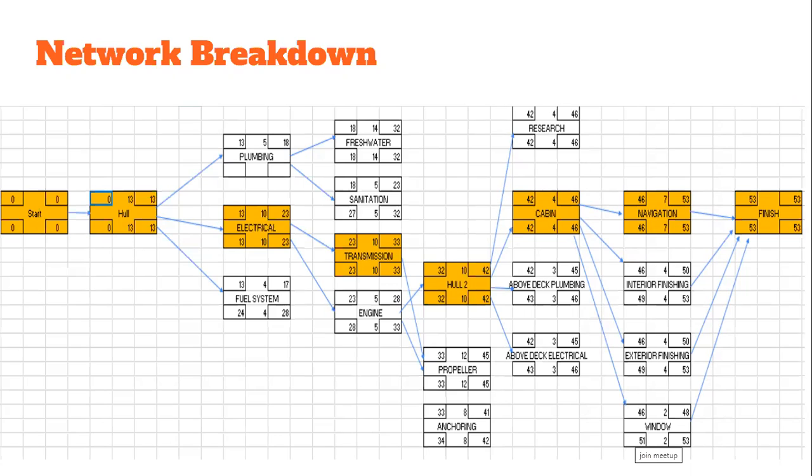After all activities were mapped, the earliest start date for each activity was calculated from a forward pass through the network. The forward pass was executed by taking the earliest start date for the first activity and adding the corresponding duration time to obtain the earliest finishing time. The earliest finish date became the earliest start date of the next activity, and the process was repeated to get the earliest start and finish date of all activities.